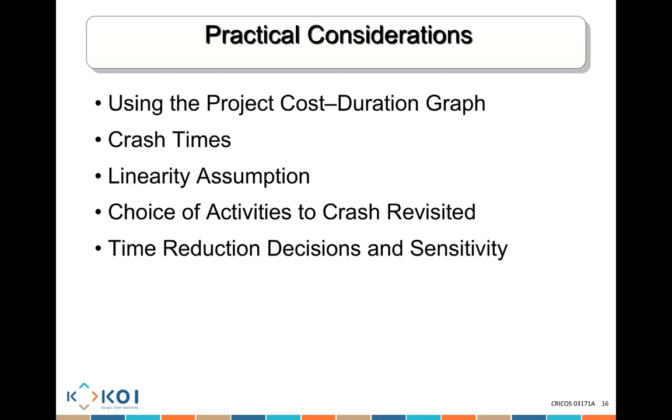You need to think that a lot of the time you don't always have to crash the activity that is going to be the cheapest. Sometimes you have to crash the activity that is going to be the most efficient and most effective one. For example, there might be one that is cheapest, but it's not a hard activity. And there's one that is more expensive, but it is the right activity for you to crash, and that's why you should consider crashing it.